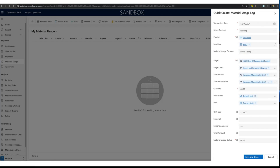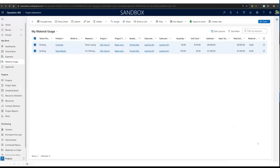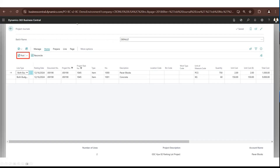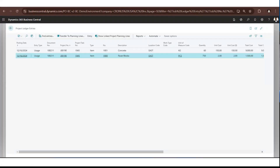Similarly, material usage also syncs to Business Central. You create material usage logs, select the materials consumed, and submit for approval. The project approver selects both material usages and approves them, just like time and expense entries. They are then sent over to Business Central under project journals of type item. Once posted, both materials are registered under project ledger entries.